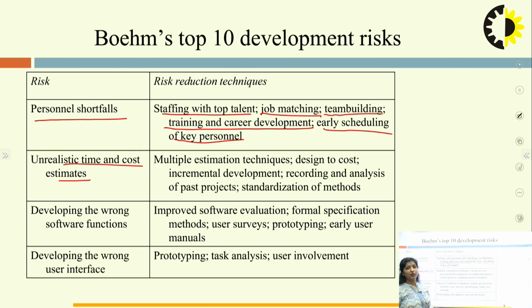So what are the reduction techniques for it? First one is multiple estimation techniques like design to cost, incremental development, recording and analysis of past projects. So again and again, we can say that the experience of past projects plays a very critical role in identifying the risk or dealing with the risk. And the last one is the standardization of the methods which is to be done.